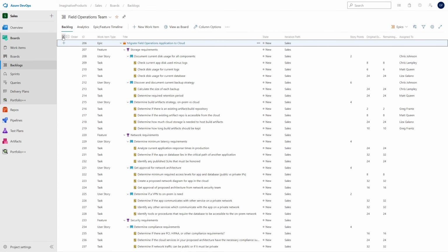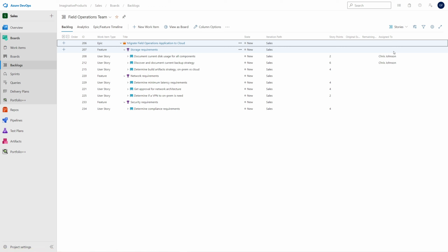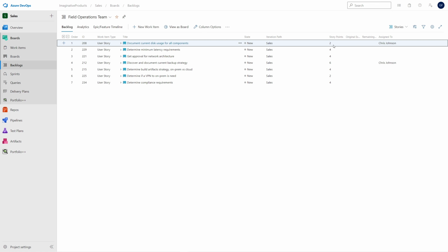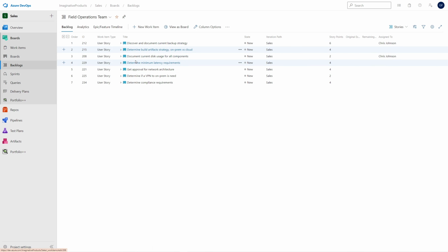Before adding stories to sprints, the team can work with the product owner to prioritize the user stories. This can be done from the Stories backlog view. Open the View options and turn the Parents slider to the off position so that only user stories are visible. Drag and drop the stories into the order they should be worked on in. If one story cannot be worked on before another is completed, be sure to account for that dependency in the prioritization.